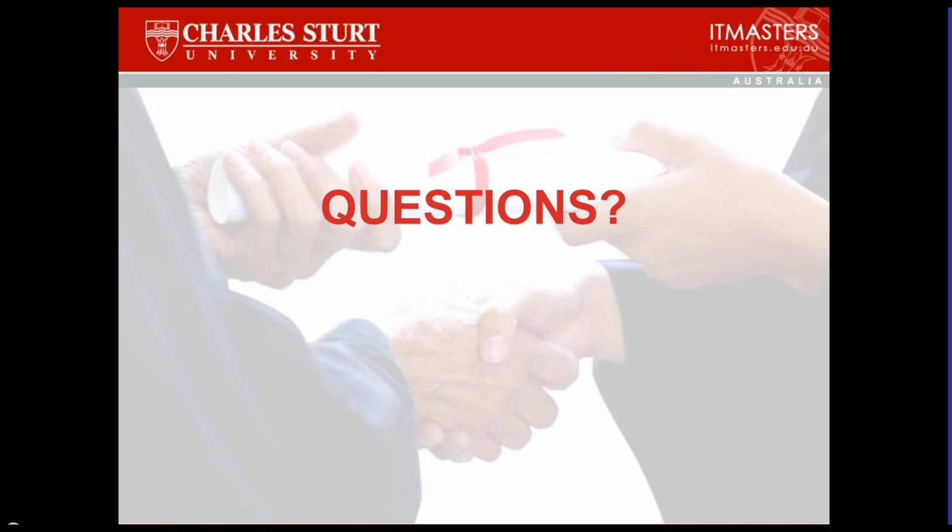How do you know that you have enough for a wave? The people that are going to make that decision are the key people out of your development team, because knowing what's going to go into a wave is not just a case of the project manager saying, well, it'd be really cool if we had all this functionality at the end of the first wave. I mean, you know, I could build heaps for that and it'd be really good. That just may be unrealistic. There has to be a contribution to that decision from appropriate expertise in the development team.